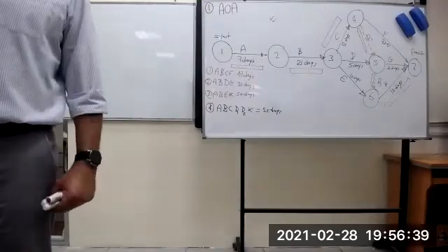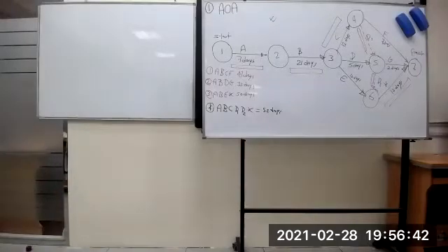Each event gets a square above it. Put in the square above event 5, 0. To reach 10, how many days? 5. To reach event number 10, there is another square above 10. How many days? 5. Right? Then there is circle number 15, with a square above it. What number should you put here? 6. So 0 plus 5, 6. So 6 in the square above circle number 20. 6. You are now at 6.